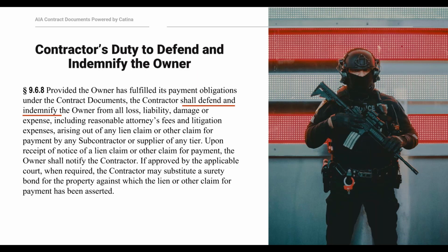They're also not going to be in a good position to know whether the CM or the contractor has paid those parties in full. Yet, importantly, for an owner, each one of those subs and suppliers has the potential, after providing work on the owner's property, to encumber the owner's property with lien claims. So that's where this indemnity obligation can be very important.